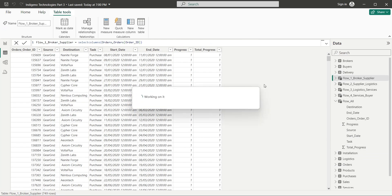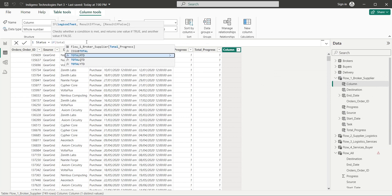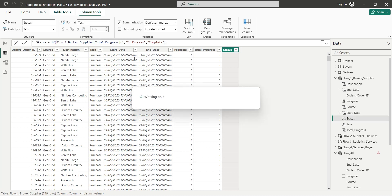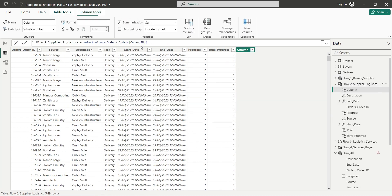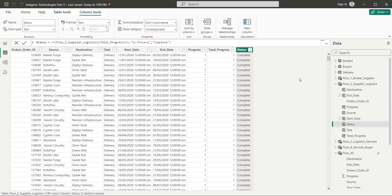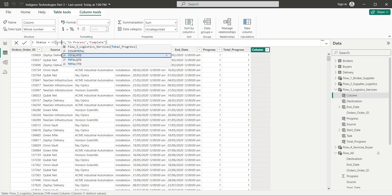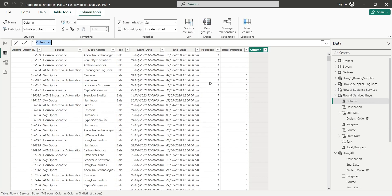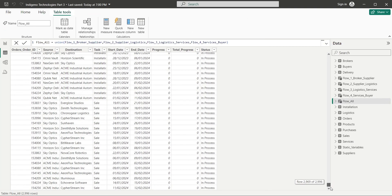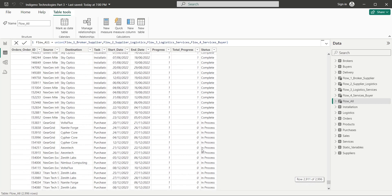Both columns are now available in the combined table now. Based on the total progress column in each table, we can add an overall status column returning values of either complete or in process. If the total progress is 1, the value returned will be complete, otherwise the column will say in process. We will add this column to all four tables.